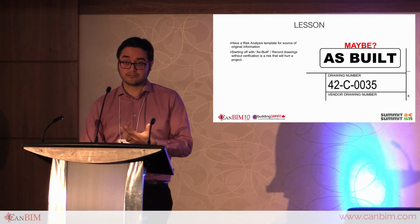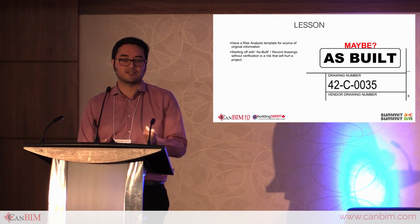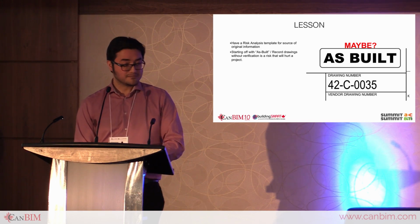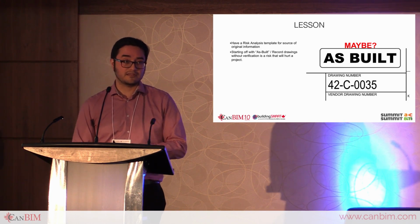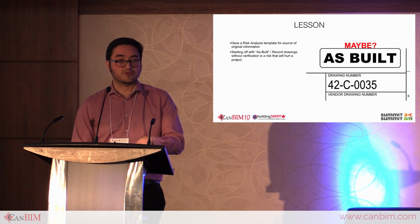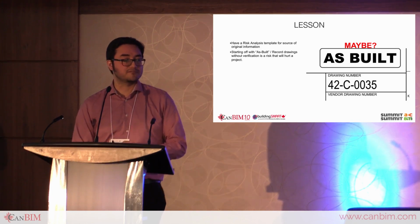And part of it is contractual. If you look at your contracts, it's usually just one line that says the contractor has to do red lines, and then the consultants have to deliver as-builts. So having a more controlled process is necessary to ensure that what you get at the end is something that's reflecting what actually got built and installed. And when you are starting off with as-built information, it's important to assess what information is known, which needs to be verified, and which might affect your specific project.